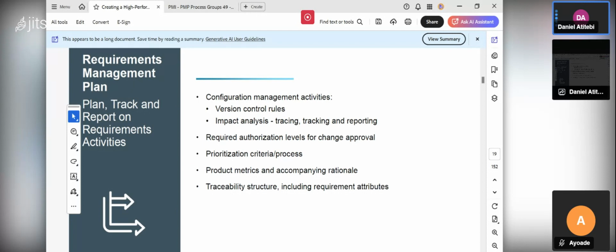So if anybody comes to query me, I can trace it back to the beginning. These are the requirements we agreed to work on, and the one we should do first. We jointly agreed that I'm going to use this requirement to start the work of the project. I will call it traceability structure, including requirement attributes and the rationale of using that requirement.